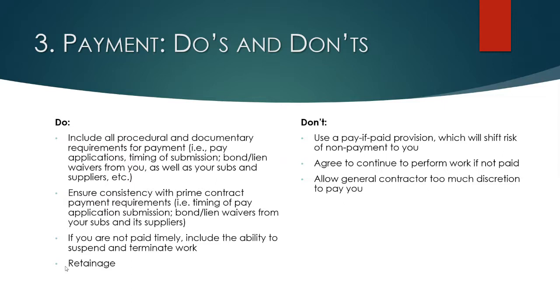Is that going to be held at a fixed percent throughout the course of the project? Is that going to be reduced to zero at substantial completion or 50% completion? Obviously, vis-a-vis the general contractor paying you, you want your retainage to be reduced as much as possible at a certain point during the project. So pay attention to that.